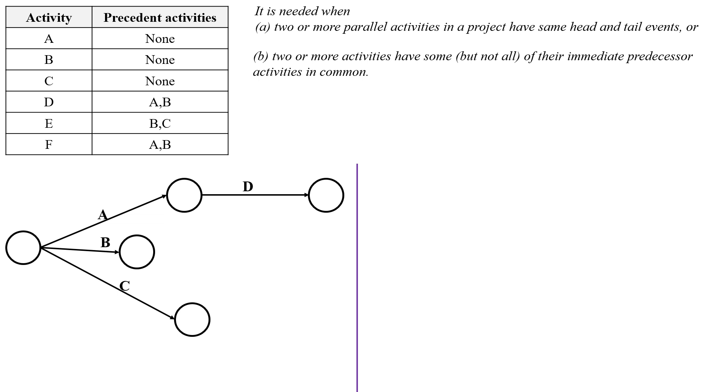So here we have to add a dummy activity like this. Now, activity D will start after completion of activities A and B.